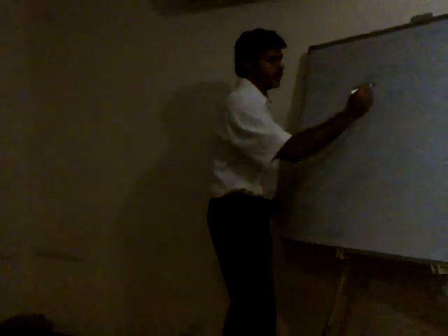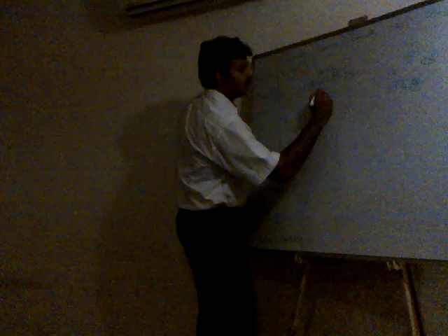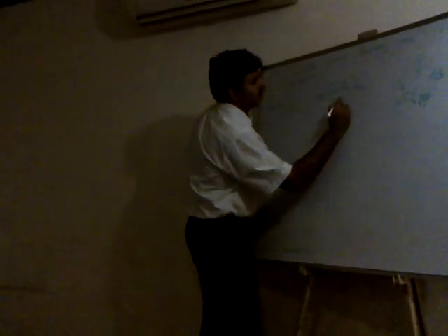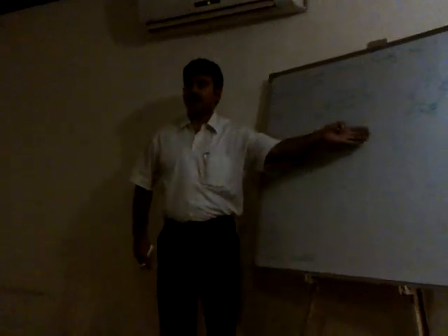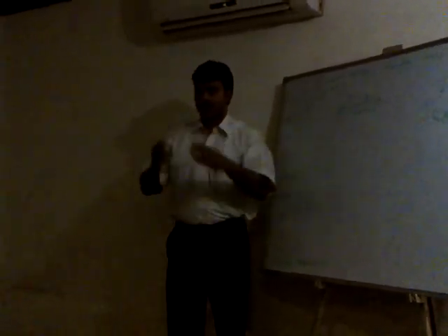Yes. Then the requirement documentation and the requirement traceability matrix, you came out with them as output. The requirement documentation is fed as an input for which process? Next process. Define scope. And you came out with your scope statement. Now the scope statement that you get at this point of time, this is not the mutually accepted chosen one. Right.